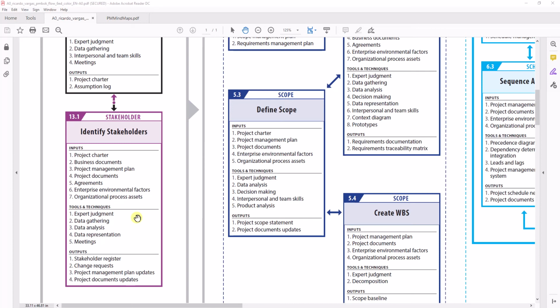And after identifying the power and interest of each group of stakeholders, you also do something called a stakeholder engagement assessment matrix. That means there are 5 levels of engagement, right? Some stakeholders may be unaware that they are stakeholders. Then there may be resistant stakeholders who do not want your project to succeed. There may be neutral stakeholders who simply don't care. They know they are aware, but unless you ask, they will not do anything. Then there are, for example, supporting stakeholders. I don't remember, does anyone know what the five are?